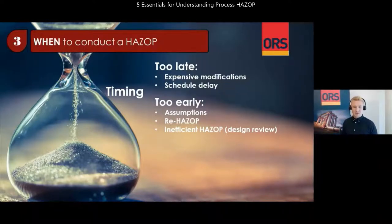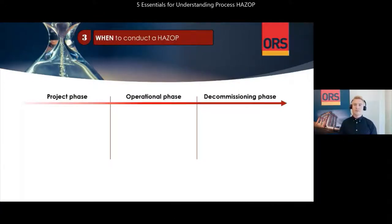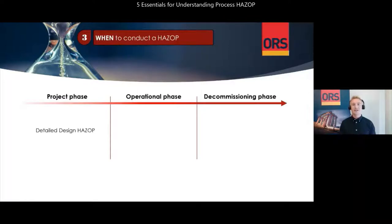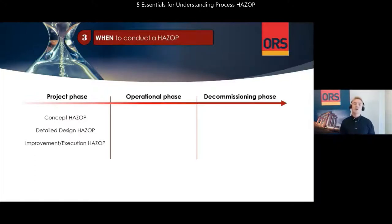Just as important as timing, it is important to have a solid management of change process to ensure that changes arising from the HAZOP are properly followed up. As a minimum, a HAZOP should be executed during detailed design — meaning when the design reaches its later stages with an almost finished design, the HAZOP serves as a milestone or a final check when the detailed design has been completed. In larger projects, HAZOP can also be conducted at the initial concept stage when design drawings are available to identify process design requirements, or during the improvement phase before construction commences.